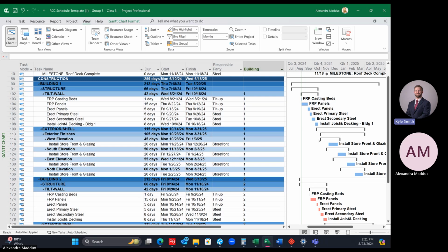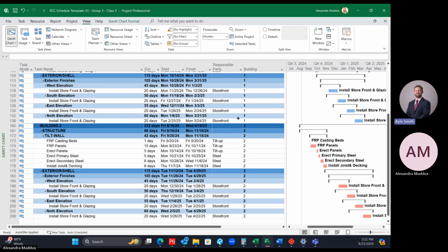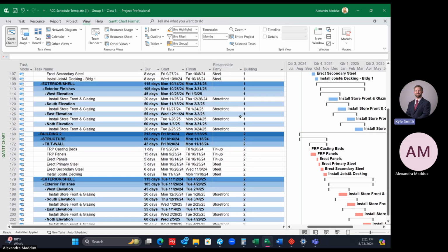Do you want to say that again, but louder? Yeah, so I was just bringing up the panel crane. I know that's one thing we always run into. So you've got a break from 913 to 919, and then it goes to 1014 to 1018. So now you'd have to adjust that date so you don't have two crane remote or two mobilizations in general. Okay.